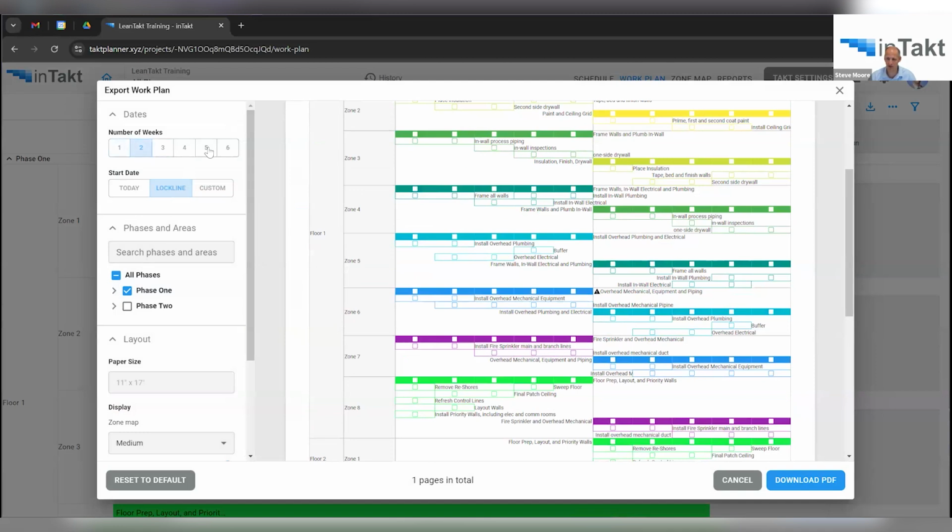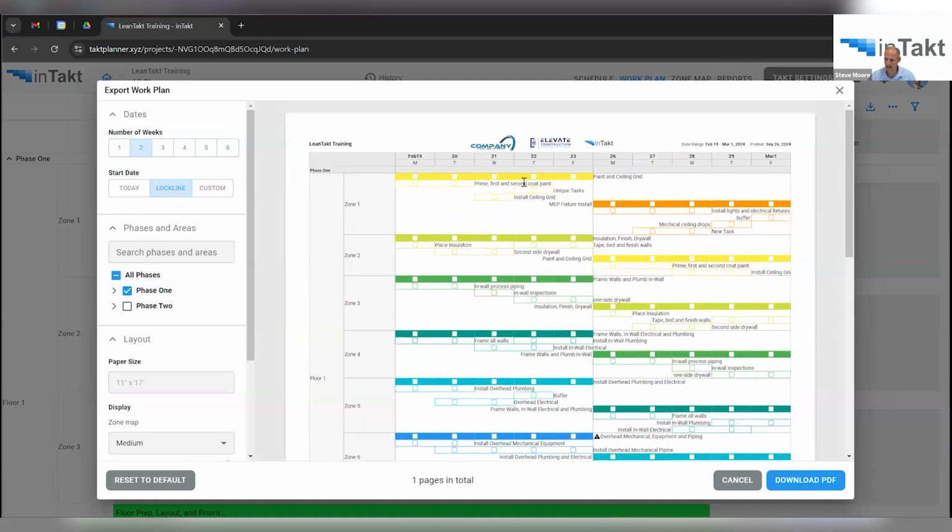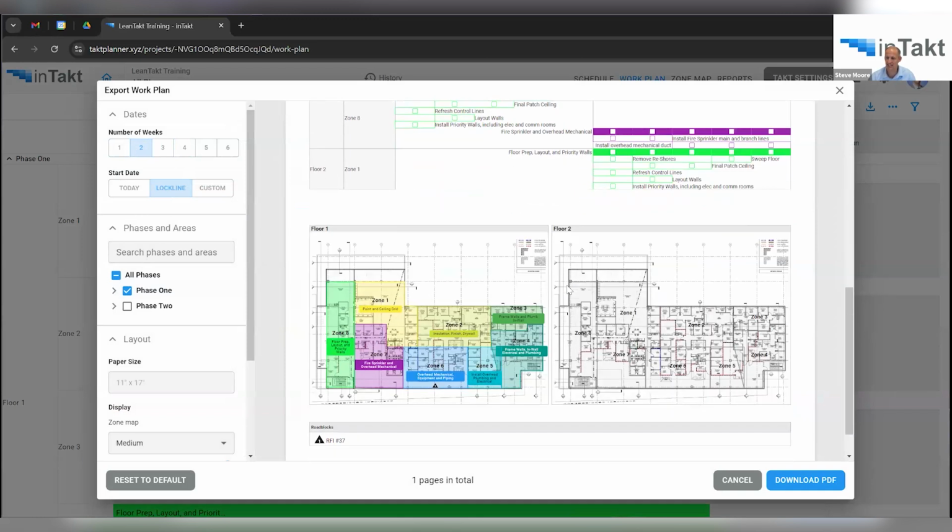For example, I'm showing a 2-week look ahead, showing with the tasks, subtasks, all listed out, really methodically worked out to show all the labels in the most space efficient way, and a sheet that I can print out and hand to the trades where they can check off these boxes, come back in, and just dead simple updates.